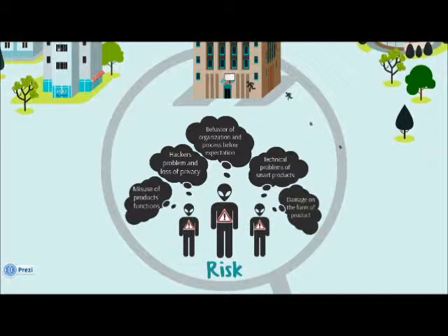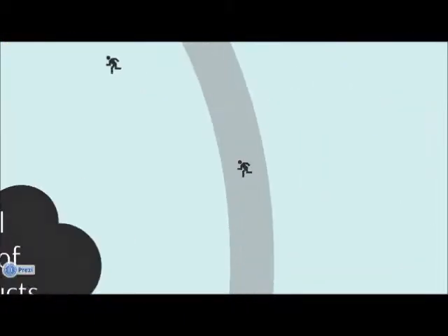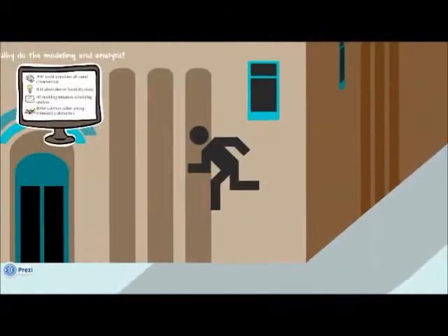There may also be some problems during the organization and process. If some key items like the smart whiteboard have a delay in delivery, it may postpone other procedures like the tablet connection and also other smart devices. In order to prevent this problem, an earlier deadline should be set for those key items, and closer inspection of the delivery is also needed.